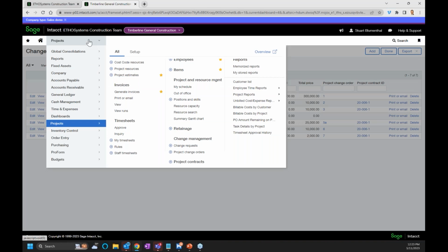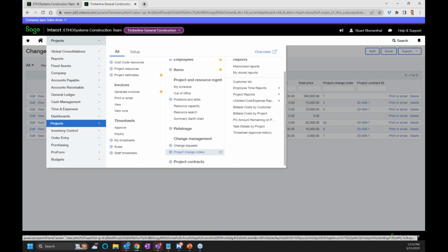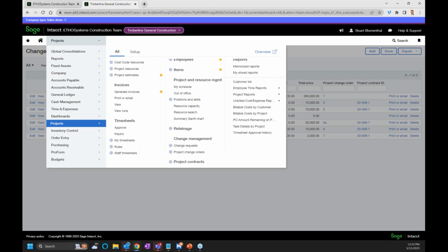The question is, can you bypass the whole request and go straight to entering the change order? The answer is no. You have to go through the request and then through the change order. I apologize for that. It is a two-step process. So great question, Judy, but sorry about that.